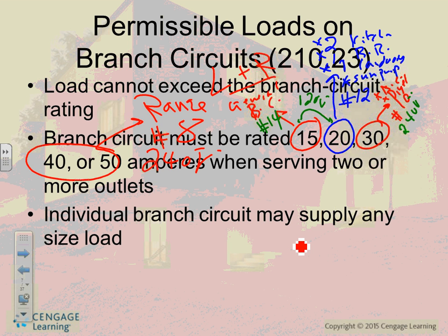So we don't typically. I'm not saying fans in the bathroom. I've done a lot of fans for the owner in the bathroom, but in a commercial industrial project, you don't mess with fans. The fans are specified, sized and installed by the mechanical contractor, and all you have to do is wire them. You're going to see soon when you go in the industry, otherwise you're stepping on somebody's toes. There's respect between disciplines, and you don't want to aggravate people. You're taking work away from certain people too. See what I mean? You know how that goes.